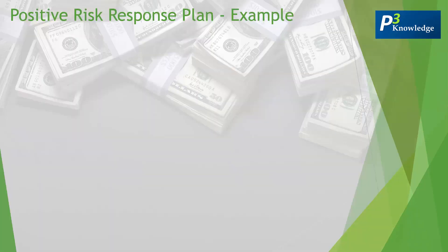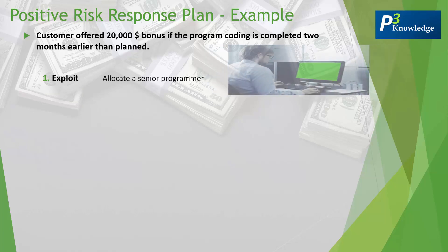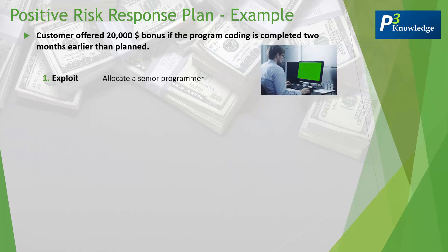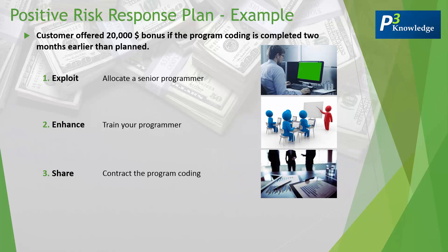Let's take an example of how to deal with positive risks. A customer offers $20,000 in bonus if the program coding is completed two months earlier than planned. To exploit the situation, we could hire a senior programmer able to complete the coding in that timeframe and capture the $20,000 bonus. The second strategy, enhance, would involve giving certain training to our programmers to increase their chances of getting the bonus. Third, share — by contracting a specialized coding company and sharing this opportunity with them to get the $20,000 bonus.